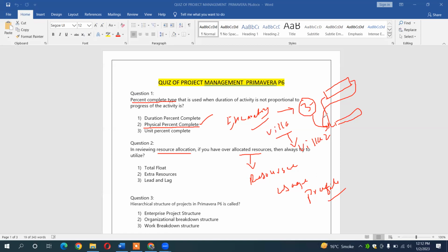But once you see that your project is not on the normal track, what is the important function you have to utilize? Always remember to hunt for activities having positive total float. It is only total float, but always hunt for activities having positive total float. Why positive? Because if you increase the number of days, you have a completely free margin on the resources side. For example, if one resource has 3 days to complete a work, and you want to complete other work in 1 day, you will not be able to utilize these 3 resources at the same time on the other work. So for this purpose, you increase the number of days like 2, 3, and 4, and you have to always find the activities having positive total float, so your float is not affected.